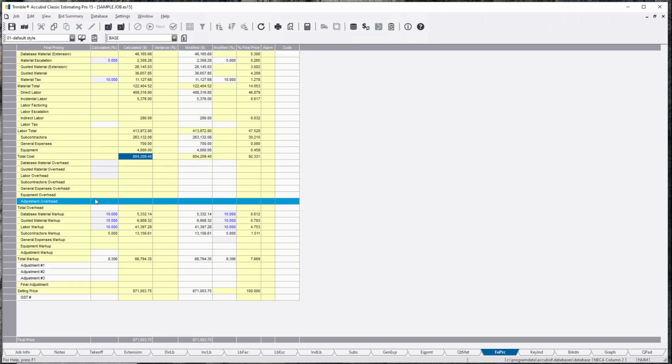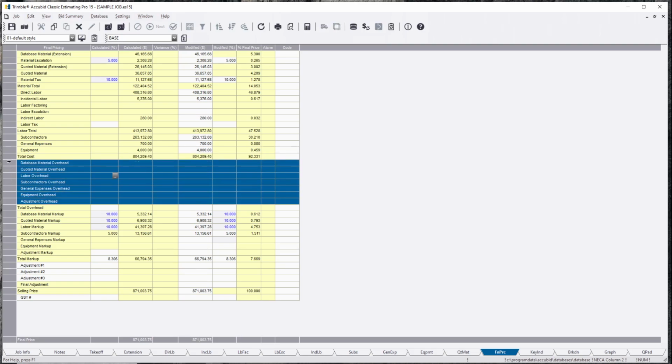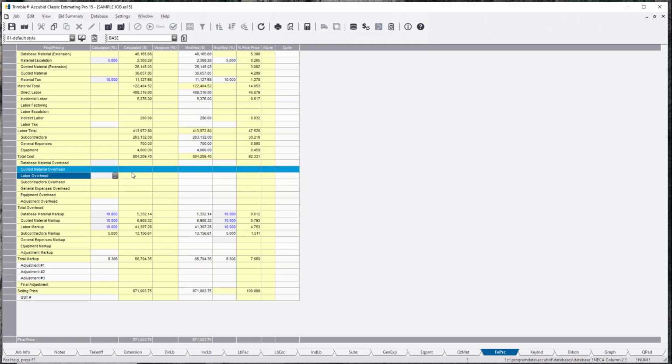Now there is a section down here I've never seen anybody use in my time doing project management and estimating, which is this right here. And I can understand why this is in here, because it just depends on the owner itself. There are owners that bury their overhead cost in their hourly rate, so the burden of having staff, you might want to throw some of that in there, maybe not. You can bury it in the hourly rate, totally up to you.